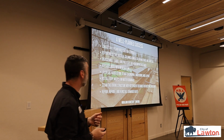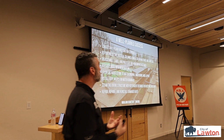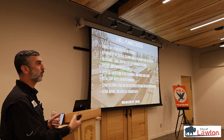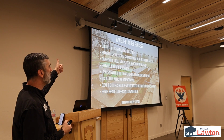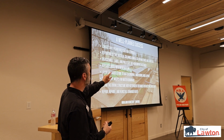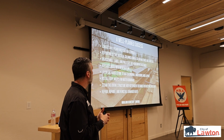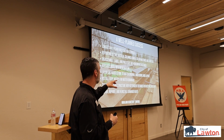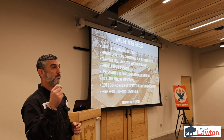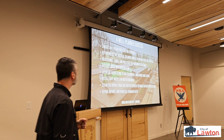It is complicated. By the time the RFP goes out, this is what the RFP looks like. While simple, it's really, really detailed in the words for a contractor. So: repoint the vertical columns using a lime mortar. Disassemble, palletize, and label the horizontal assembly. They called for a new lintel with a W-beam across there, and then to lay all of that up in the exact same place and orientation that it was before, as it was documented.